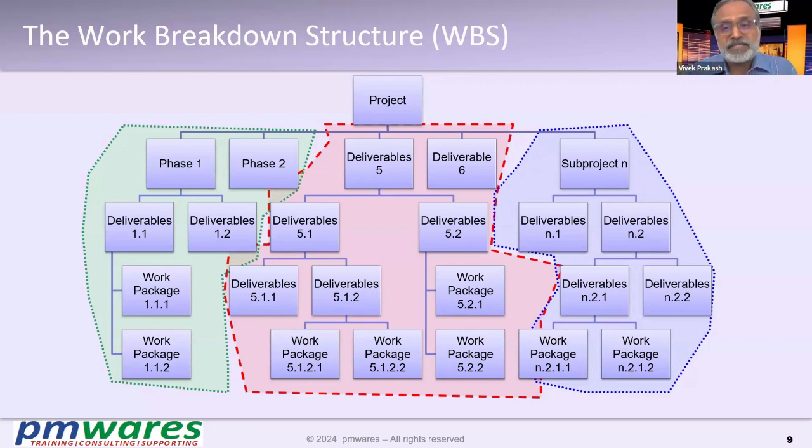You do planning as detailed as your WBS is. If you merge 2 or 3 tasks together, your task will become more ambiguous, less clear. And if you make it too detailed, they become unnecessary overhead. So we have to have the right balance in the work breakdown structure, that is WBS.